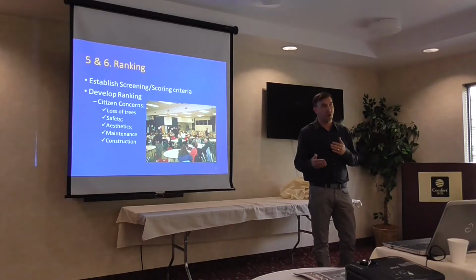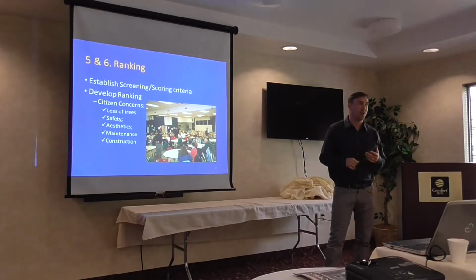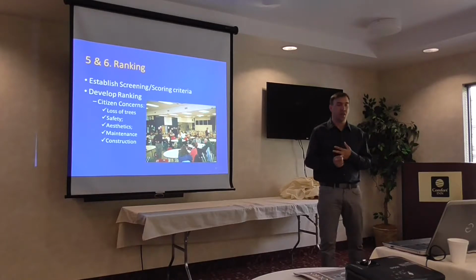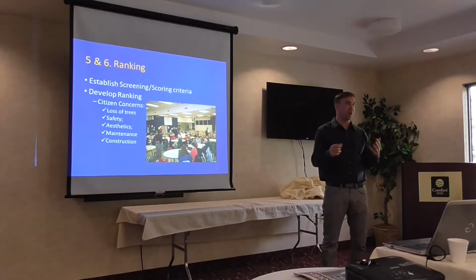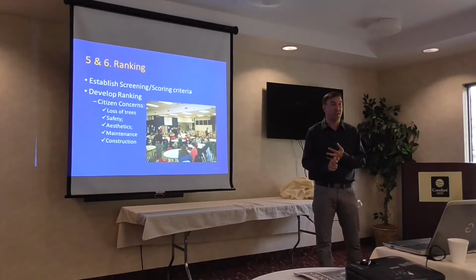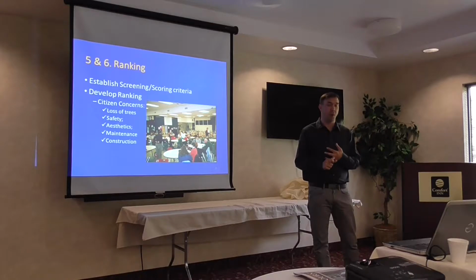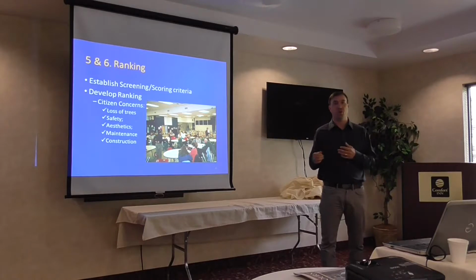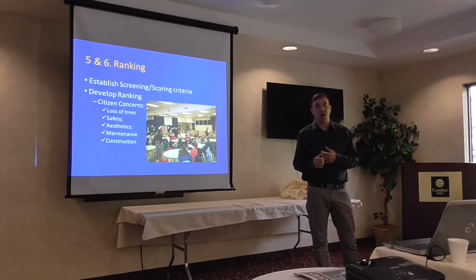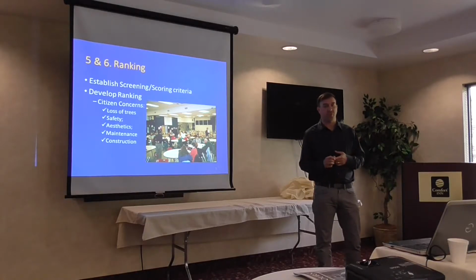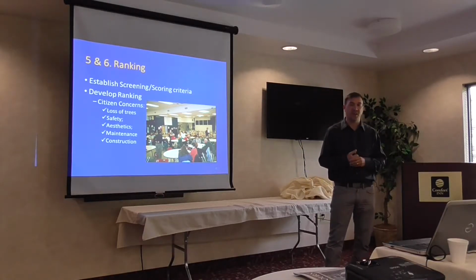But there may be other factors that you may want to consider: demonstration value. Is it at a school where kids can use it as an outdoor learning environment? Is it someplace that's already a problem, and so you're going to have to fix it? These are maintenance problems, and you're going to need to fix it anyway. So let's go ahead and boost this one up the chain because we got to get in there anyway. And it may be based on citizens' concerns. So some of the projects may require tree removal, and that may be unacceptable. There may be safety considerations for some of these. There may be aesthetic considerations.